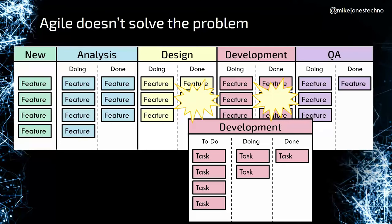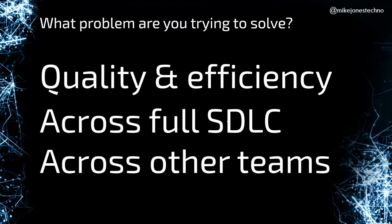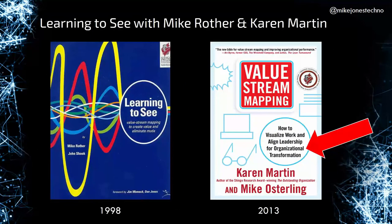Kanban boards are great for spotting bottlenecks — we can see stuff piling up between columns, even when we're using WIP limits. But we can't see other types of waste in the system and how it can get better. A lot of my challenges in testing weren't about optimizing the testing activity itself — they were caused by requirements not being clear enough, bugs in the code, coding quality issues, security and performance issues. My main bottlenecks were caused by the result of other teams, which led me to look at value stream mapping.